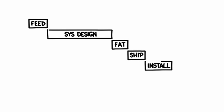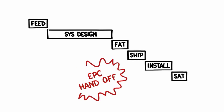And because it's so complex, the automation guys press us to have this figured out early, long before construction. They need all of that information so they can design the system layout, including controller and marshalling cabinets. And those are specifically designed for our process. You mean each cabinet is custom built for the project?